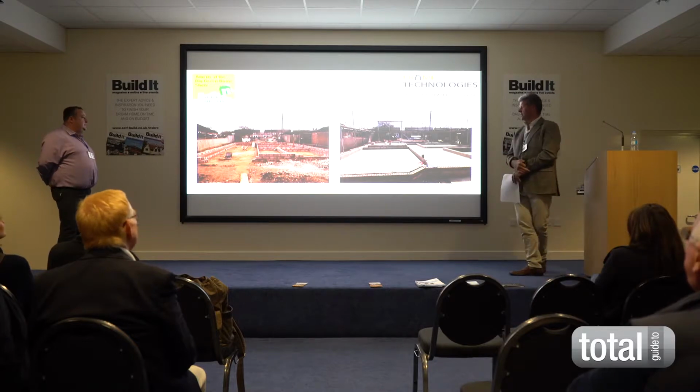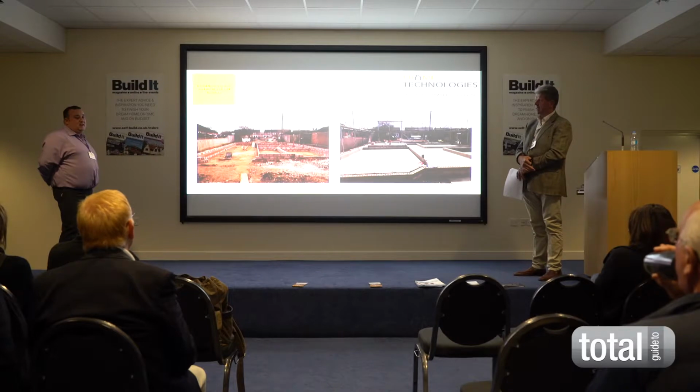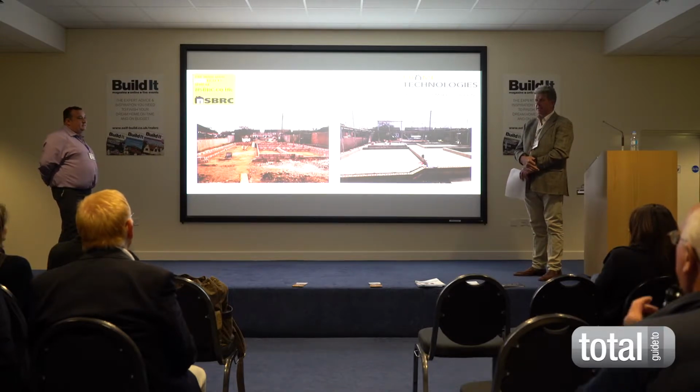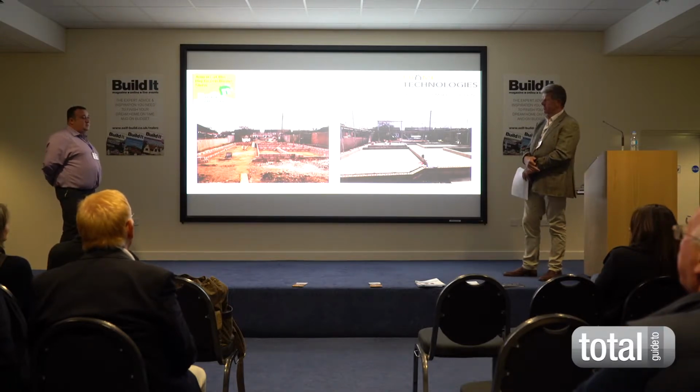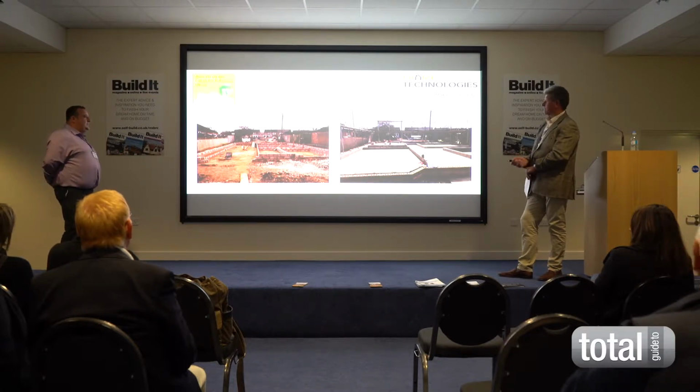You had quite a lot of muck to take away from the site, did you? Yeah, probably spent about £7,000 clearing muck away. And that's on top of the cost of taking the old bungalow away as well. That was another £7,000. So don't underestimate the cost of waste removal.